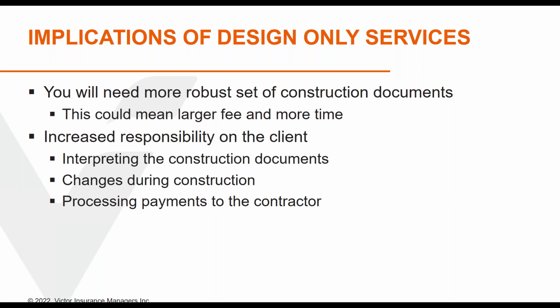Now, if the client hires a third party to administer the contract, that's one way that owners are addressing the increased responsibility portion: they're simply hiring a construction manager. And then these items will be done by that construction manager. But if they have not decided to do that, then the client has to be very aware that they are going to be doing more during the construction phase.